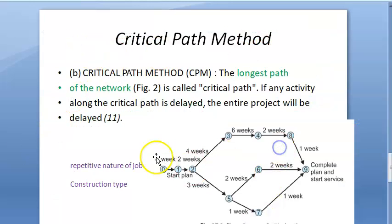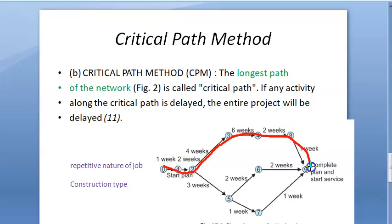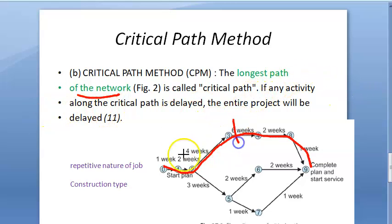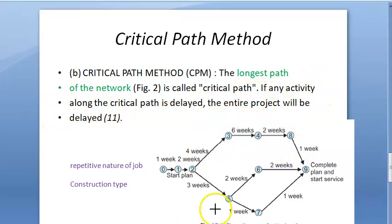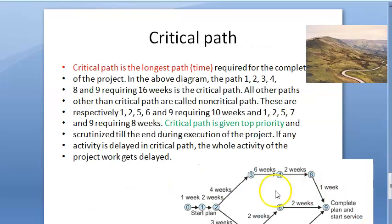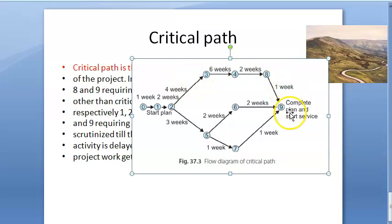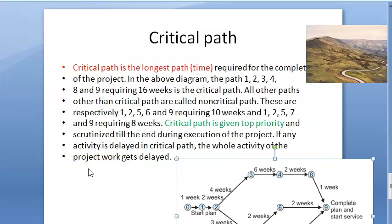In the Critical Path Method, you draw a similar arrow diagram but focus mainly on the path that takes the longest time — that is the critical path. The longest path of the network is called the critical path. If the critical path is delayed, the entire project will be delayed. The critical path is given top priority.